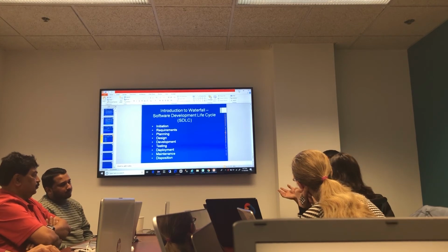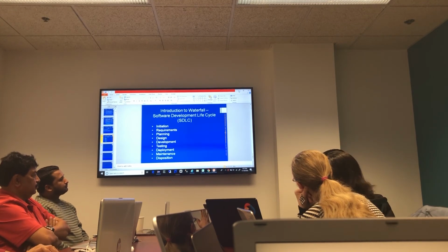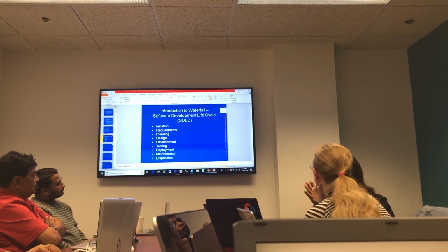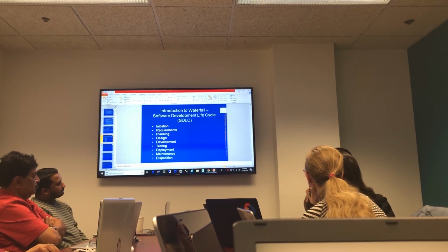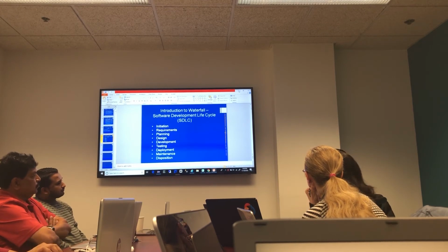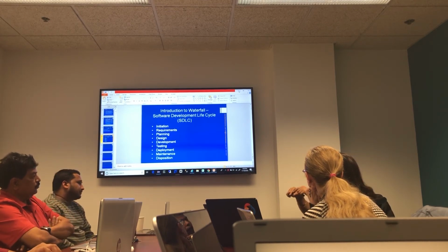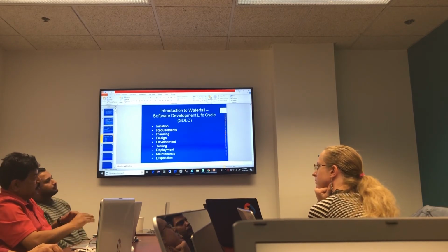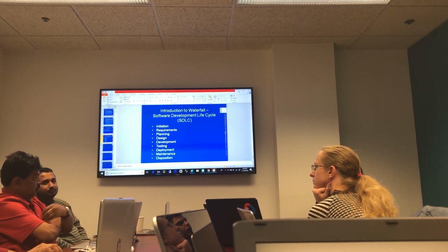time it will take. And how development works is, if during the testing phase the client says that I want to take out 2 functionalities, then you tell them that it'll take 4 months more and will cost you another $1 million to take out the 2 functionalities. You say, why? I'm taking it out. You say, because you're doing it at the wrong time. But there is a possibility of continuing that, finishing, and then recreate the next change order.